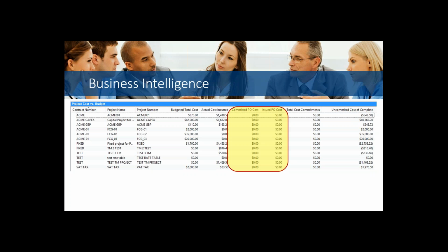Committed purchase order costs are costs where I have issued a purchase order. There have been some partial receivers against those purchase orders, but not everything has been cleared. And in that case, my designation represents, for me, a timing. I received partial items on this purchase order, so I expect the rest of that purchase order to be cleared in a fairly short-term time frame.